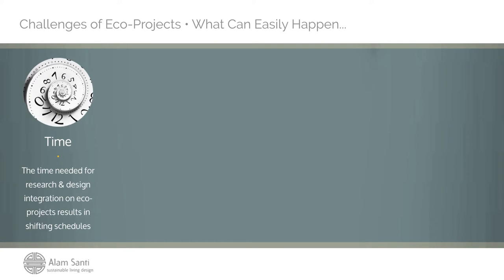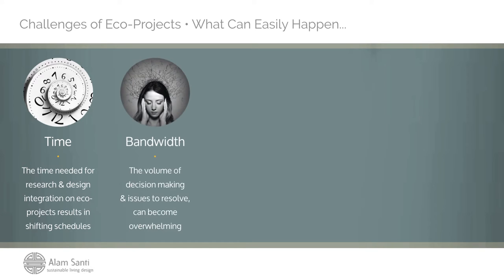What results from the combination of innovation and complexity on one hand, and visionary mindsets on the other? AlamSanti has seen that key challenges easily arise. First is time — there's a lot of extra time required for research and for design integration from different specialists, and most often the project deals with a shifting schedule, taking longer than expected. There's also a bandwidth challenge — a lot of decision making and issues to resolve that we don't think about at first, which can get pretty overwhelming for both clients and designers.